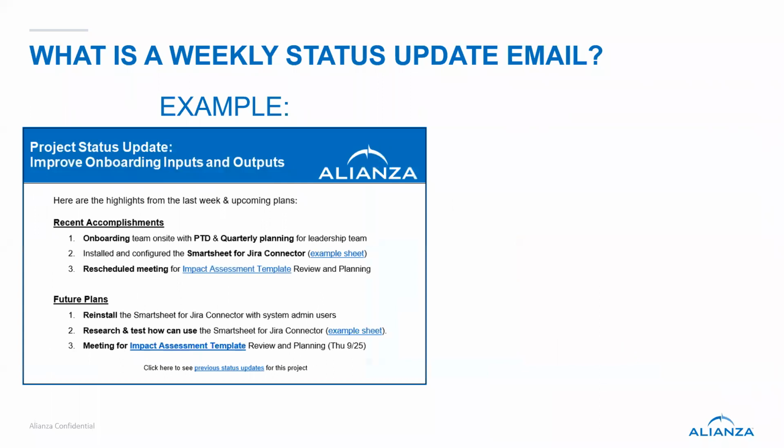Okay, so here's an example weekly status update. Here are the 3 things we accomplished. Use hyperlinks for deliverables as much as you can so that people can click through and see what they need. And some best practices. Be concise. If at all possible, keep your updates to a single line. It forces you to be really concise, which helps because executives don't want to read a blurb of text telling the story about what's happening. They just need to know this happened, this happened, this happened. Okay, this is executive level consumption. Keep it concise.